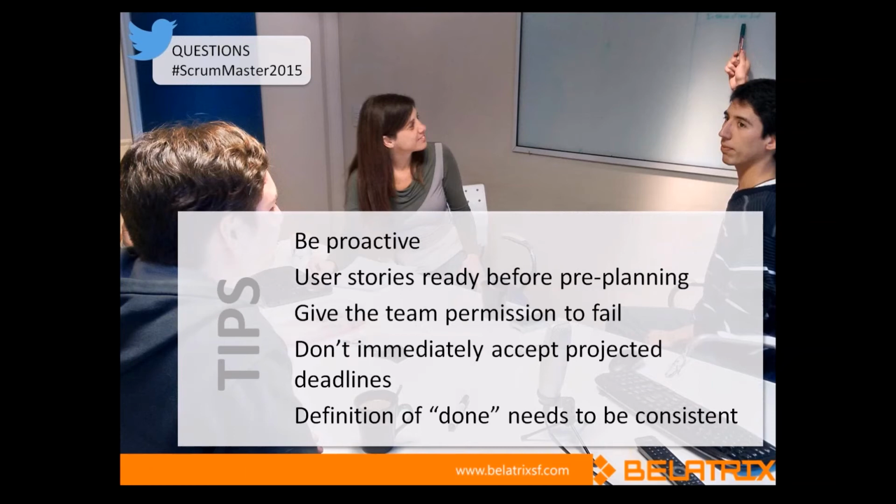Just to add some things to what the girls just said. In Scrum, you have the sprint, right? At the beginning of the sprint, the team and the customer agree on how many user stories and tasks they are committed to work on. Along the way some issues arise, and some of them are very critical for the customer to have at the end of that sprint. You have to deal with the customers in order to maybe remove some user stories or tasks that you were supposed to work on during that sprint, in order to put in that new critical issue that the customer wants at the end of the sprint.